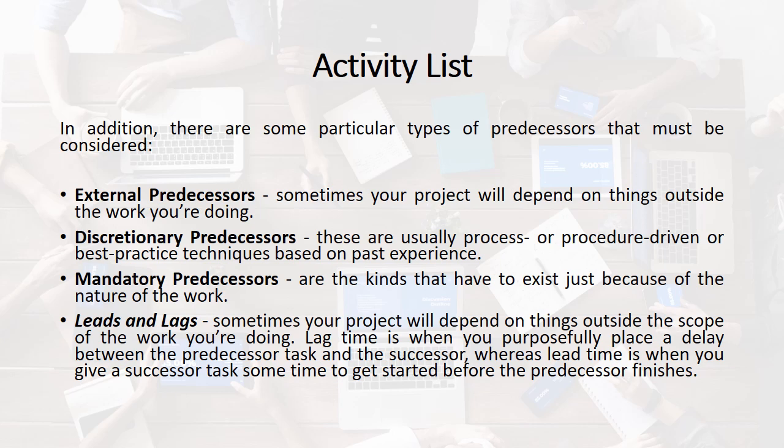Leads and lags. Lag time is when you purposefully place a delay between the predecessor task and the successor, whereas lead time is when you give a successor task some time to get started before the predecessor finishes.